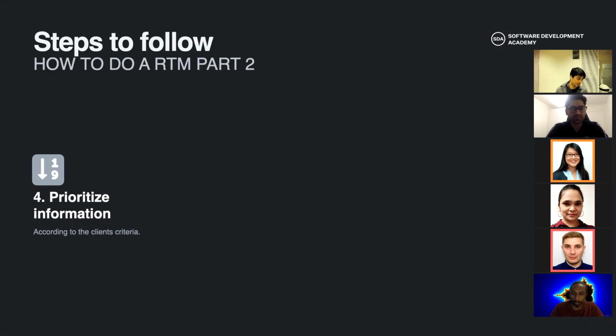Why? Because if you remember the case study that I showed you about the SDA platform, you know that we don't have a video conference system installed in the platform. You know that we use Zoom. We are literally on Zoom right now. So the product owner negotiates with management and tells them we will not be able to finish the new platform, because remember we have a different platform and we need to migrate.